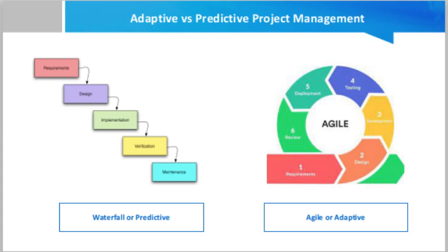Now, predictive project management. The predictive methodology focuses on planning and analyzing the projected future in depth for anticipated risk, also known as the waterfall method. This methodology relies on an early phase analysis and a detailed breakup of features and tasks for the entire development process. In this traditional model, you define standard timelines to complete tasks and dependencies between tasks. This also determines the critical path and a projected completion date.